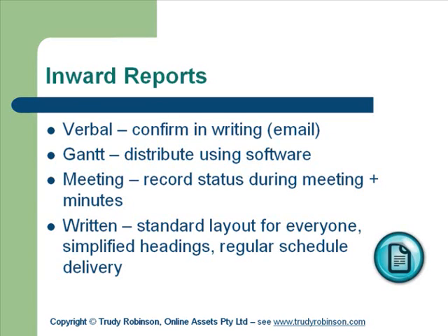Okay, so you might also update your Gantt using software. Now, quite a lot of Gantt programs, and I don't know about the one you're talking about on Apple, you can actually download somebody's responsibilities, send it out to them electronically, they can update it, and when you receive it, it actually updates the Gantt chart. Now, that's usually the Primaveras and the more sophisticated software programs that do that. Microsoft Project was meant to, but I don't know whether they do, as you can tell, I don't use it that frequently. The 2007 version has, but if you've got 2003, they will not talk to each other. You cannot open the other Gantt charts.